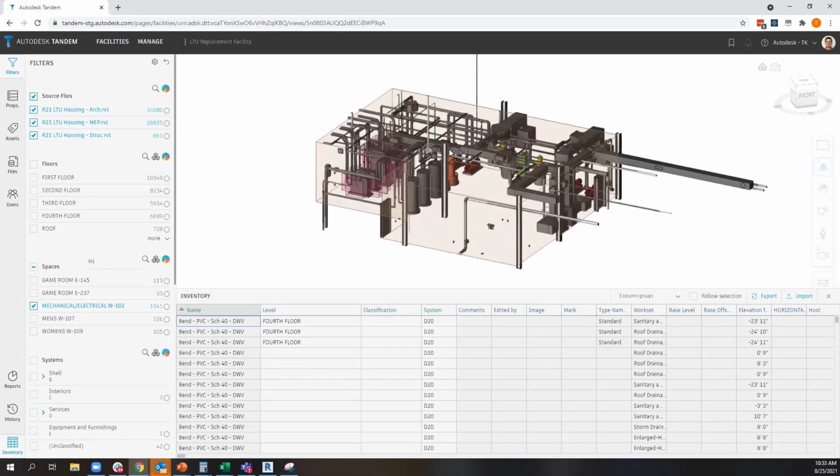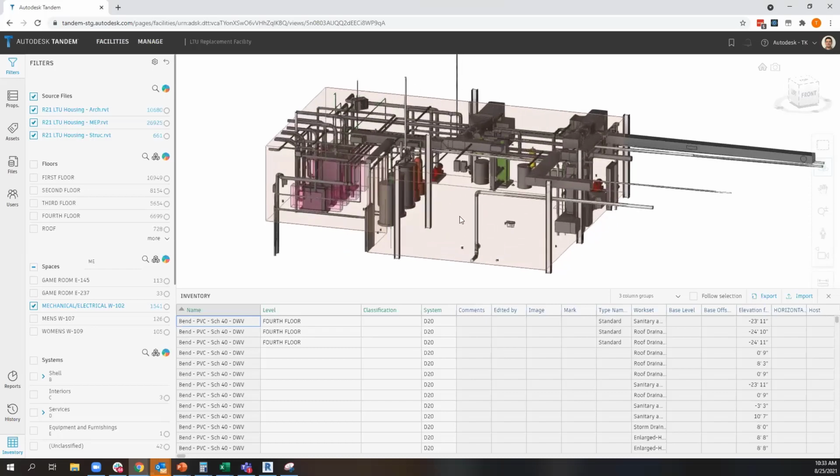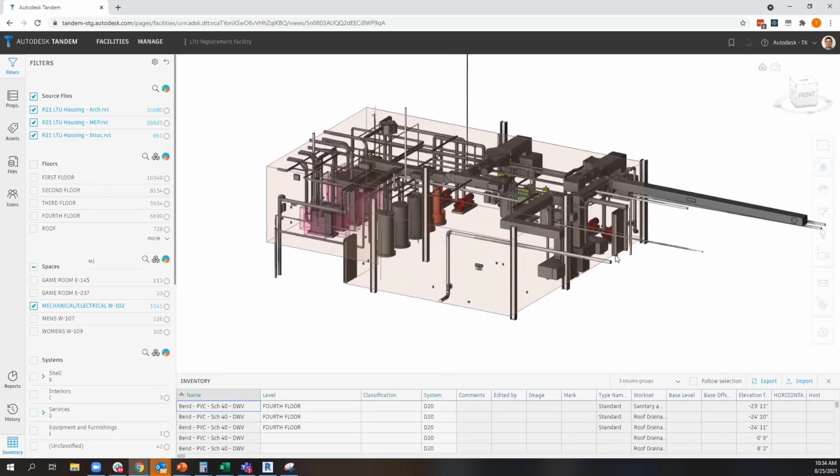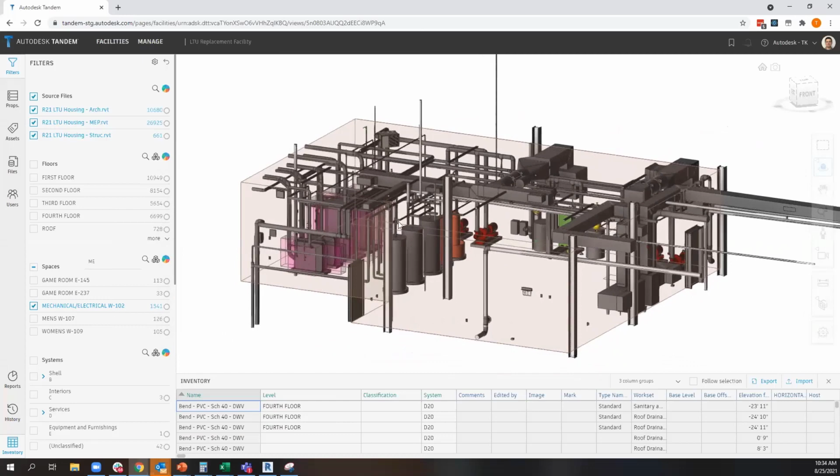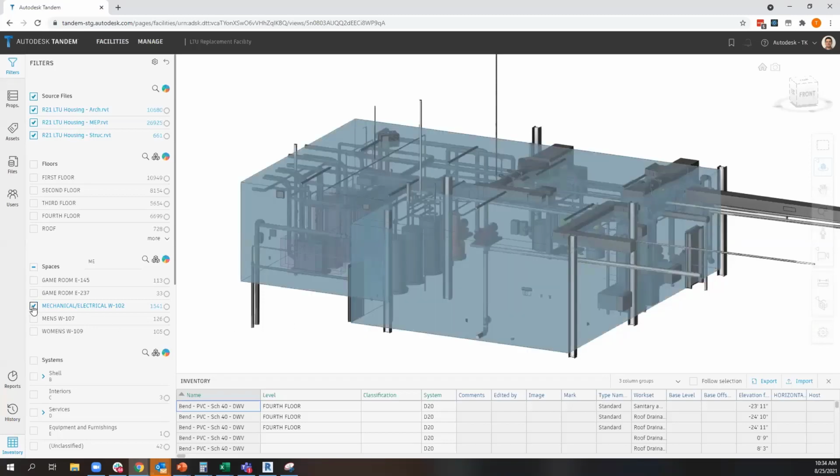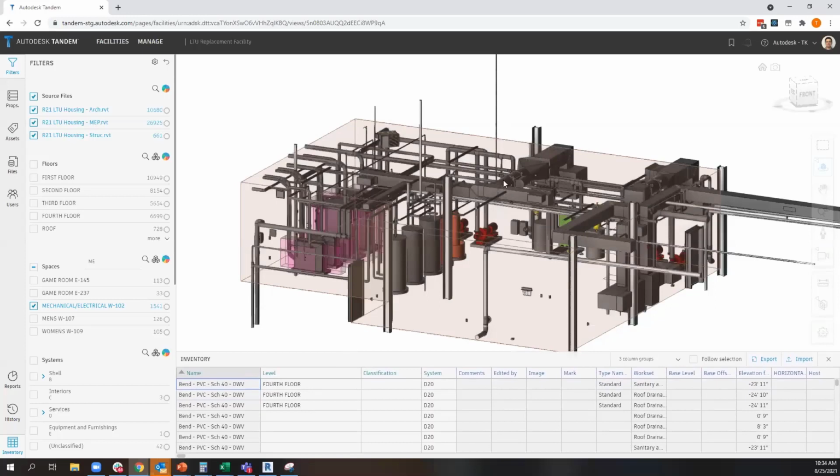This is important because as we think about defining all of your assets, oftentimes assets are tagged or organized with reference to that location. Prior to this kind of capability, it's a very manual task to assign where a particular pump is located as part of its equipment ID, or to understand the layout and structure of the building as we begin contributing data. For example, my mechanical contractor is finished in this particular mechanical room, and we can begin the commissioning process for some equipment in there, or capture that installation data for that particular room. So we can really leverage this cross-referencing of multiple models, and also leverage that space to select and find the assets contained within that space.